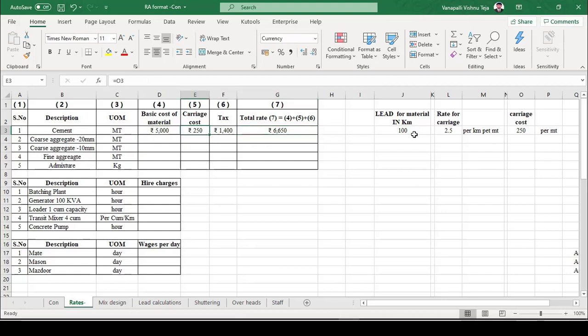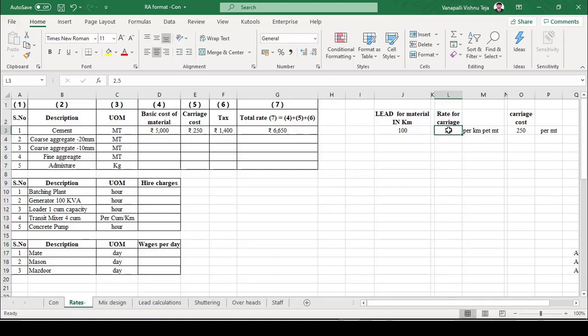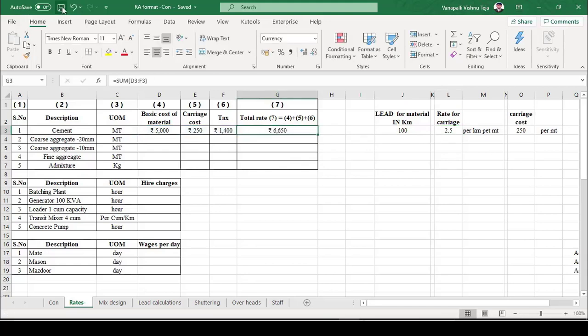Usually the transportation rate may not be constant — it varies for every 10 to 25 kilometers, so keep that in mind. Also, for works awarded by state government departments, you can use the standard schedule of rates of the respective state governments to get the rates.